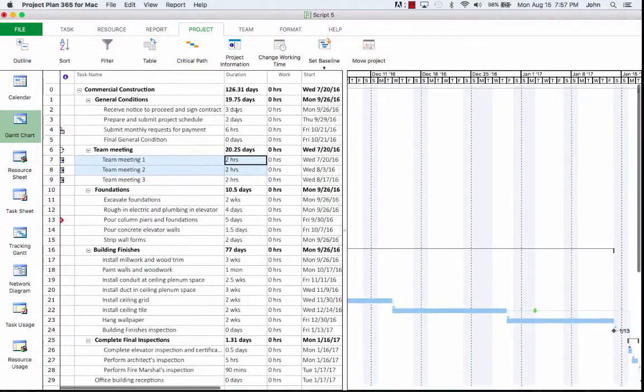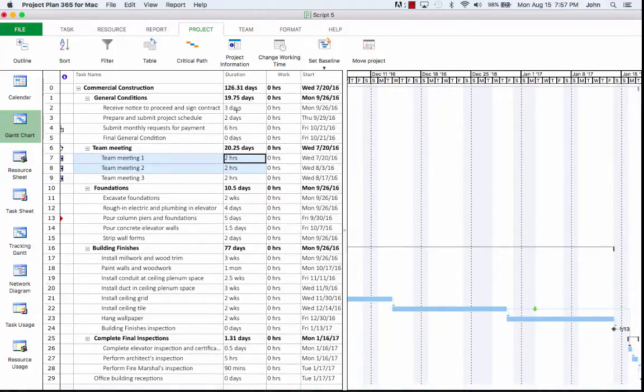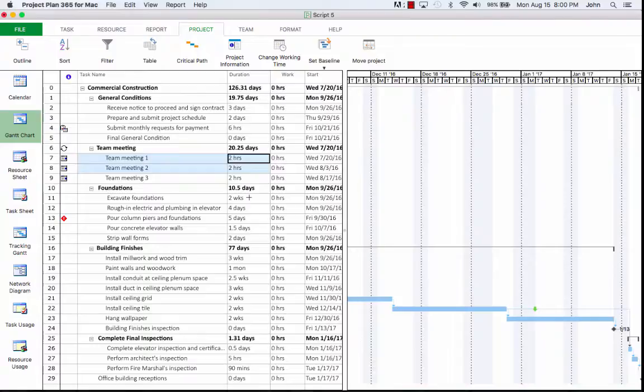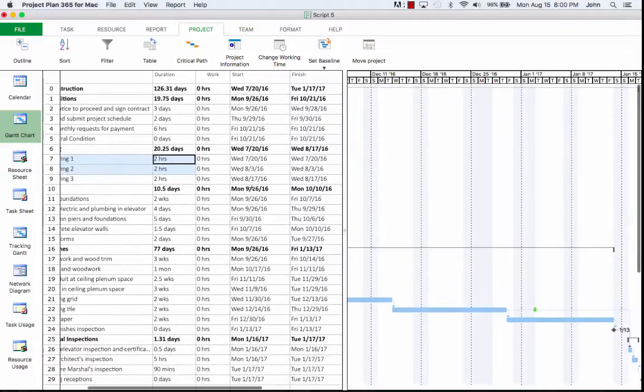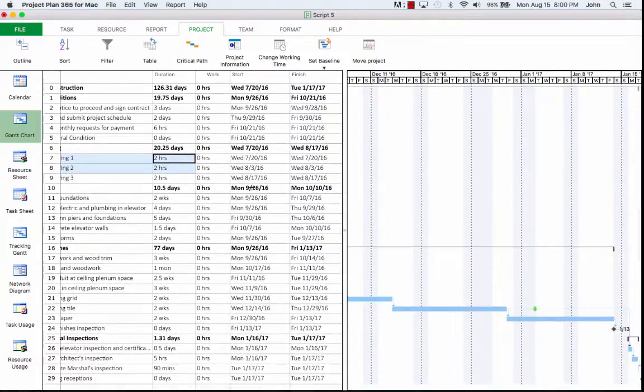More exactly, the end date was pushed later, and some tasks will start later according to the new finish date of their predecessor. If you set up some non-working times, tasks will not be allowed to take place during those times. This shows how changes in the calendar affect the tasks in your project. We'll notice also that the finish date of our project has changed, and it now finishes on January 17th.